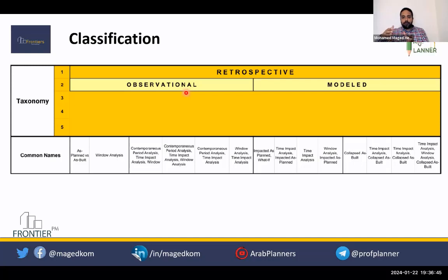You have a planned program, and an as-built program or actual records, and then you are comparing it without adding, without running the program. You are comparing and analyzing. You can do it in a tabular method with a table and the details and the variances and what these variances are. Is it critical or not critical? Is it concurrent or not concurrent? And then you add it event by event or duration by duration until you finalize your analysis and get a result without running a program, without adding or subtracting from the program.